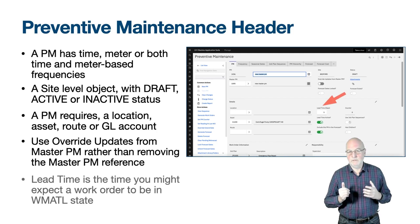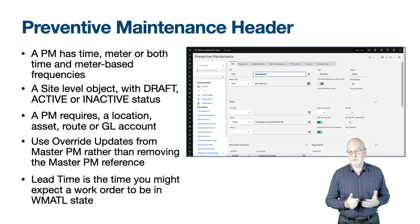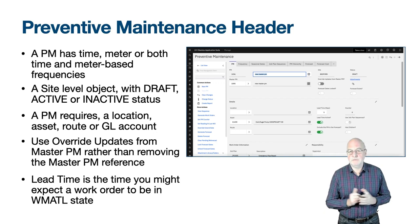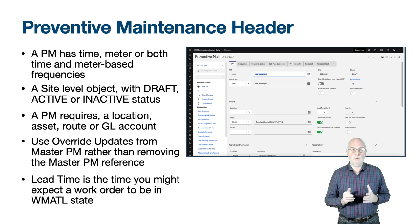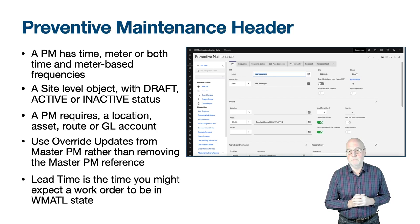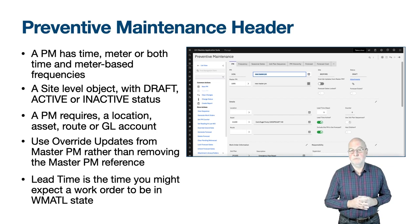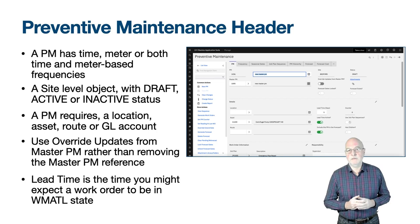The lead time is the number of days prior to when the next work order will be required to start, providing time to prepare or plan the work order, including purchasing materials or services. Think of this as at least the amount of time you expect the work order to be in a waiting-for-material state (WMATL). The lead time in days field defaults to zero and can only be set if 'lead time active' is also set. If lead time active is toggled off, the lead time days field will be made null.